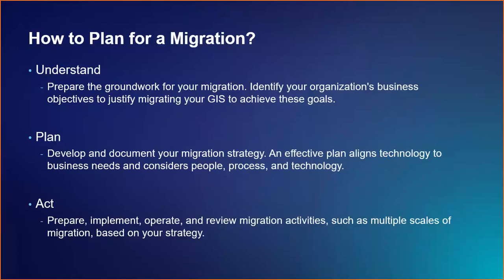You might be a small department where you're a 1 or 2 person GIS shop and you can do this yourself. If you're a larger organization, you're likely going to have IT involved. So they need to know when do they have a systems analyst available to run a backup or be available on call as you execute the actual upgrade. You're going to think about things like risk planning. What happens if it doesn't work and you have to do a rollback? You need a backup for that.